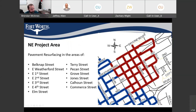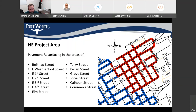For the northeast project area, related to the pavement resurfacing, we'll be doing resurfacing on Belknap, Weatherford Street, 1st, 2nd, 3rd, 4th, Elm Street, Terry Street, Pecan Street, Grove Street, Jones Street, Calhoun Street, and Commerce Street. This will be Group 1 of the area the contractor is looking at paving, and we'll get to the schedule a little later in this presentation.